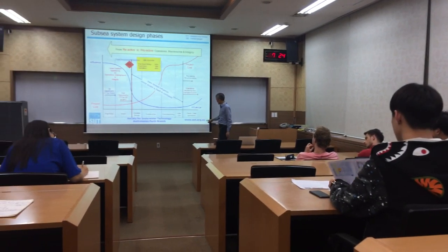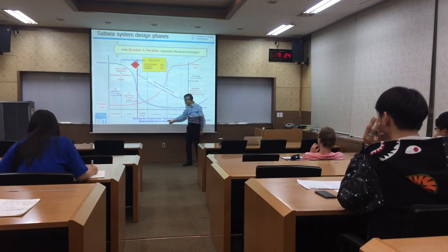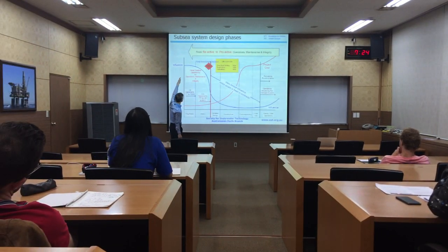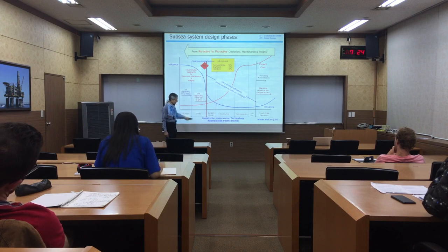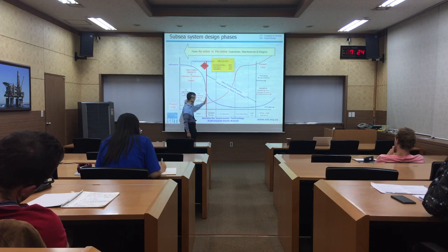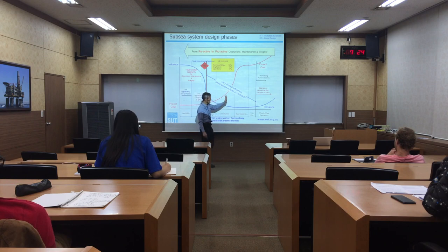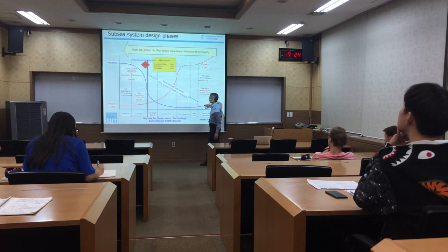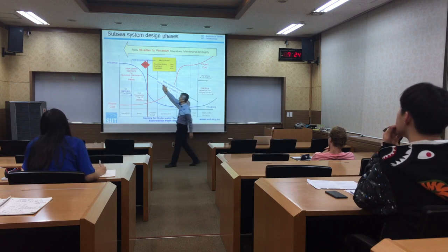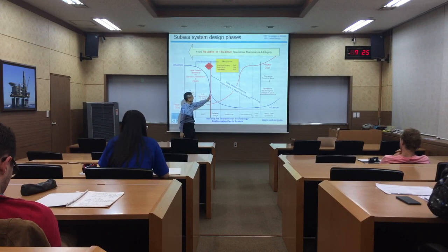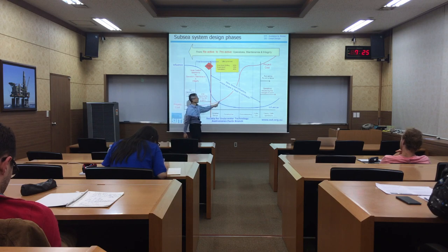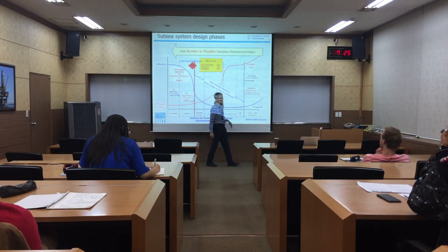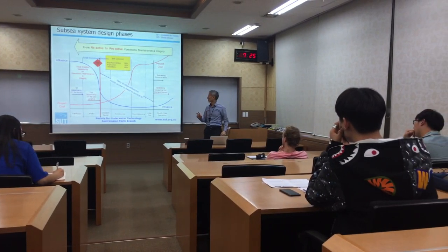This is coming from the Society for Underwater Technology, Australia Perth Branch. And they are saying the influence is higher in the early stage of design. This is the timeline. Pre-FEED, FEED, detailed design. Contract design here between FEED and detailed design. Construction, commissioning, and operation, and maintenance and operation. And then the influence of design, or influence of change, is decreasing very steeply during the contract signing stage. But actual cost is involved. Used money, you pay money for construction and procurement. Size is increasing. So design is very important for this stage, the early stage.